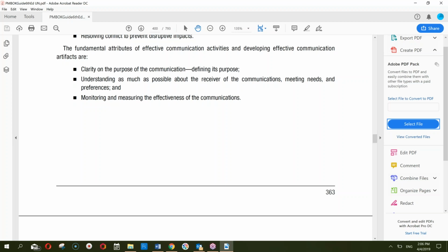You must keep in touch with your stakeholders and keep talking to them all the time during execution, to see if they are okay with the type of communication going on or they want some addition or improvement. Similarly, in monitoring and control, we will do a postmortem of how the communication has happened, what we did wrong, what we did right, and how to correct it. If there is a need to correct something, we may even move a change request for that. But a change request will only be moved if that communication is affecting the scope, time or cost of the project.